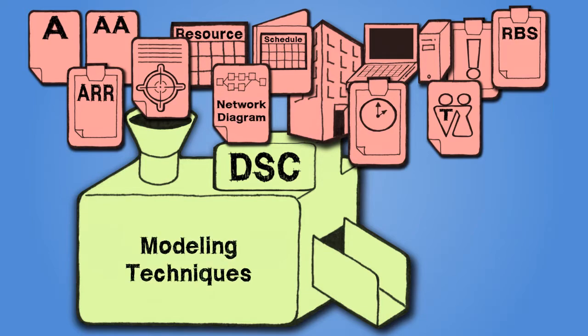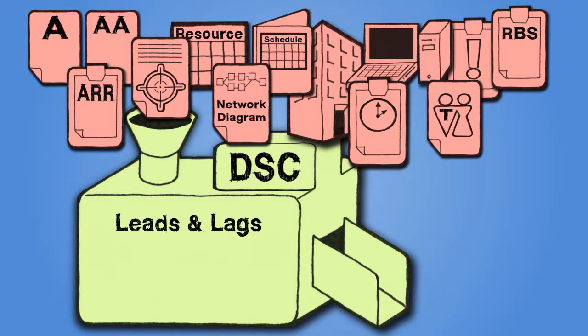Modeling techniques like the what-if scenario is another tool used, and it's often employed by using a Monte Carlo analysis. A Monte Carlo analysis systematically applies hundreds of different variables to the activities in a computer simulation, and it processes the best scenario for optimal scheduling results. Leads and lags in the time between each schedule activity can also be applied to the activities as part of the scheduling process as they become apparent.